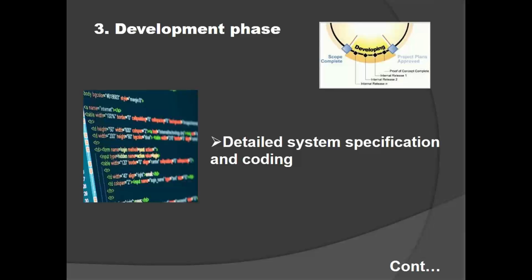That means we have to do analysis from day 1 to day 20. Here we will check whether we have completed in 20 days or not. For example, if you have taken 18 days, then you have to give a reason why you completed 2 days early, whether the client has reduced some requirements or whether any resources did some extra work, whatever it is, we are going to explain.